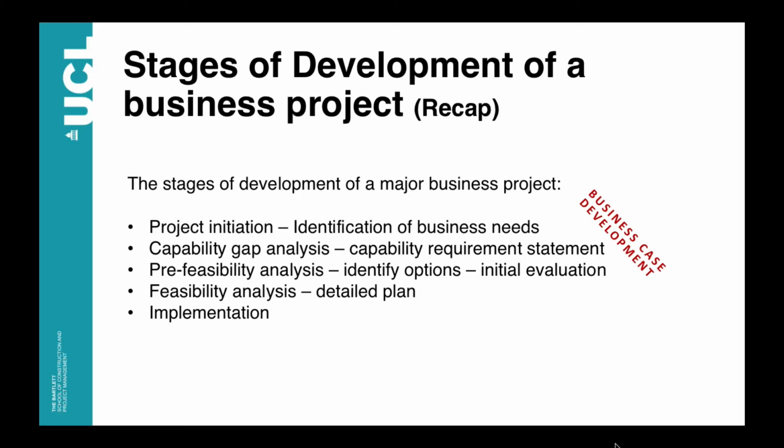After that, it's time for the analysis of the different options through the pre-feasibility analysis, which provides an initial evaluation, and with the option or a small range of options that arise from the pre-feasibility analysis, we will perform the feasibility analysis, which will provide a much more detailed plan that will be finally implemented.